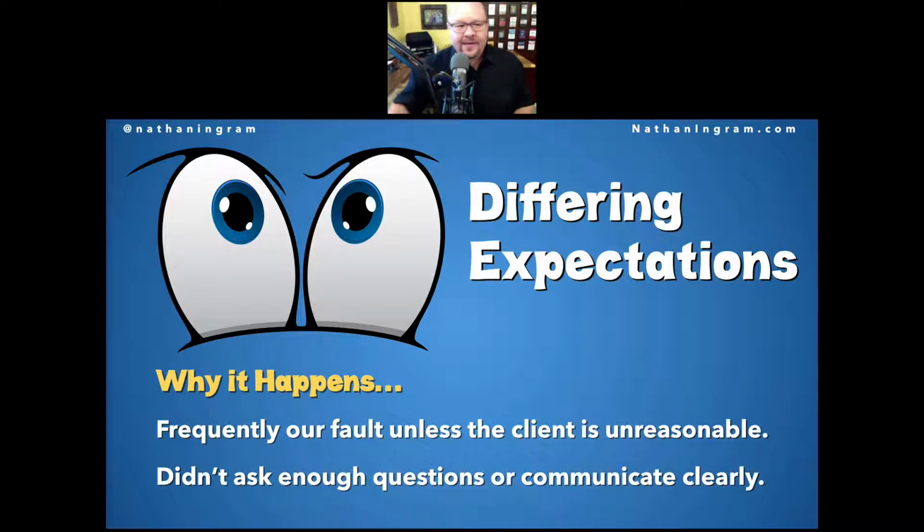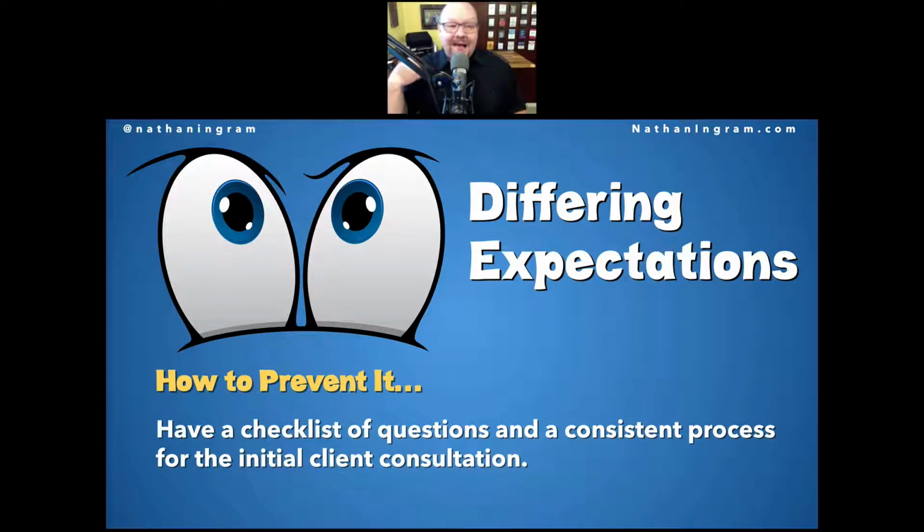How do you prevent it? One of the things I suggest is to have a checklist of questions and a consistent process for the initial client consultation. So how many of you go into the client consultation and you have a set list of questions that you ask for every client, every project, every time? Most people don't. If you do, you're ahead of the game. And by the way, just having the list is not helpful. You actually have to ask the questions.